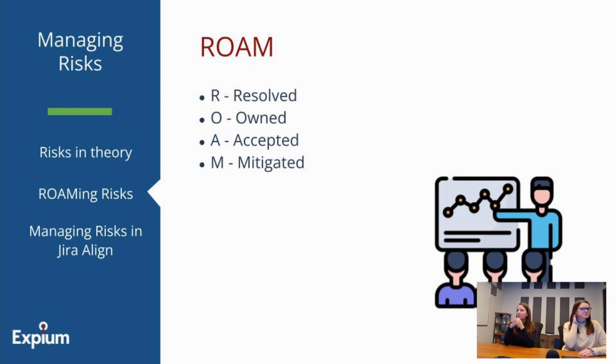So, for example, we identify a risk that our team is understaffed to complete the work that's expected of us. And this is so common. I see it time and time again. And I would argue that letting the team accept that risk is a burden that they don't need. I've never been more moved than watching a manager move that type of risk from accepted by the team to owned by the manager. So owners of risk should be people who can move the needle of that risk, if not now, then in the future.